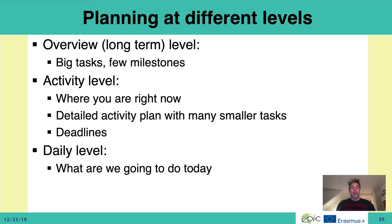You can plan at different levels. At the overview, long-term level, you have big tasks and few milestones. When you get to the activity level, you need to detail out the activity plan with many smaller tasks. But this can be difficult or even meaningless to do from the beginning, because you don't know the detailed activities before you get there. There is also the daily level — what are we actually going to do today?